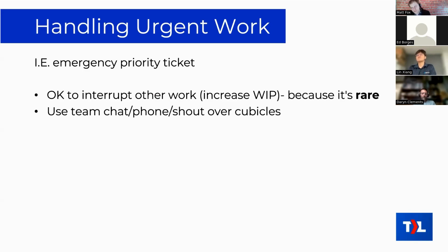That means that we're increasing the work in progress, because if we do interrupt somebody when they're working and ask them to work on something else, and they haven't finished whatever they were working on before, and now they're working on something new, that increases their work in progress by one. As long as it's a rare sort of thing, it's not a big deal. You're going to fix the emergency, get that ticket completed, and then go back and start working on whatever it was you were working on before.